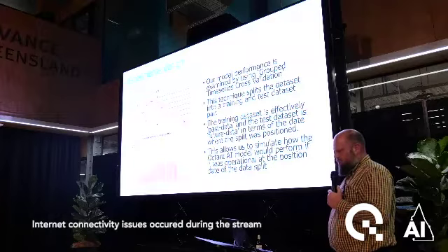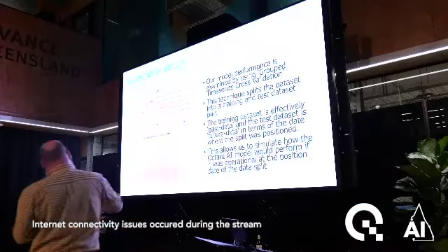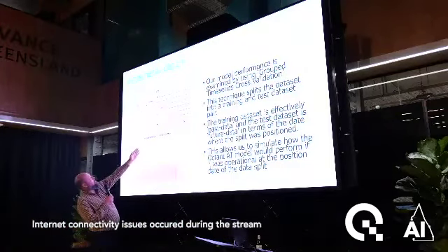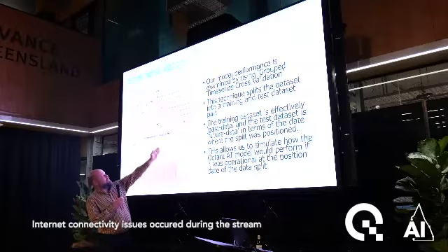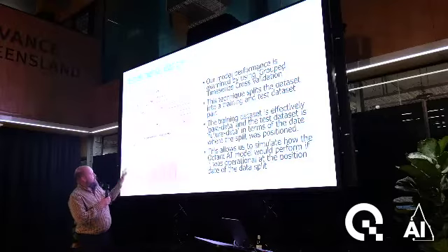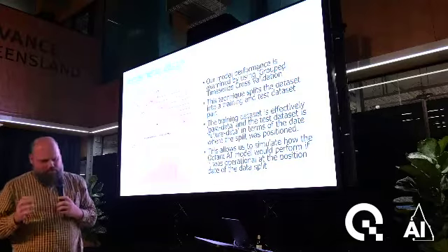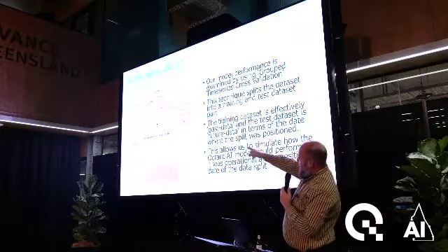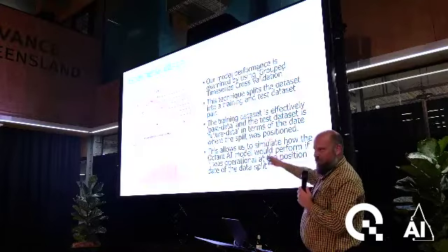We use a grouped time series cross-validation. In essence, you're trying to prove to the customer that if you're using our model at this point in time, that's where we do a split between the training and the test, and we say, over the next test period, this is how we performed. But we do it again, and then we look at the errors that were generated, and we try to find the correct model to minimize the errors through that period. And so then we're confident. When we give them the model at the end point, we can fit that whole period, and then we can let it go forward in time.